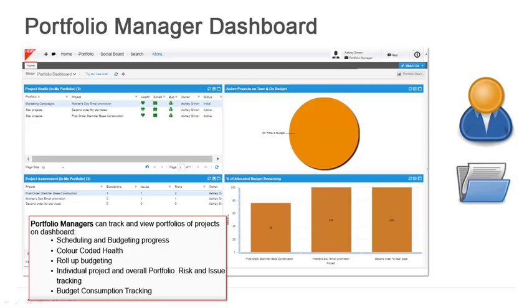The individual project and the overall portfolio risk and issue tracking can also be done. There will be a roll up of the issues and risks related to the individual projects within the portfolio, but you can also create portfolio level risks and portfolio level issues. There are specific symbols and we'll take a look at those a little bit later on, and the budget consumption tracking.